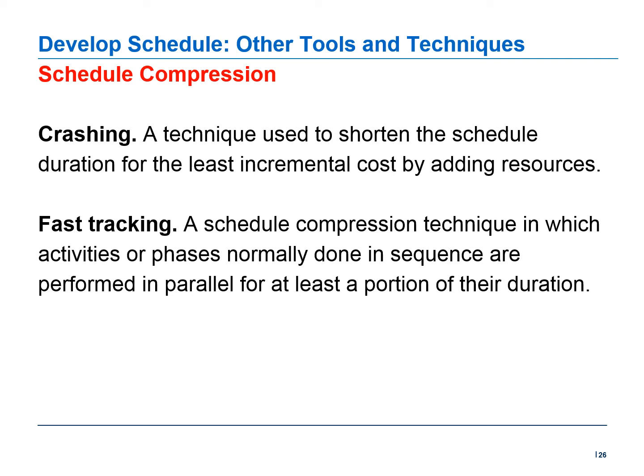Crashing, a technique used to shorten the schedule duration for the least incremental cost by adding resources. For example, approving overtime, bringing in additional resources, or paying to expedite delivery to activities on the critical path.